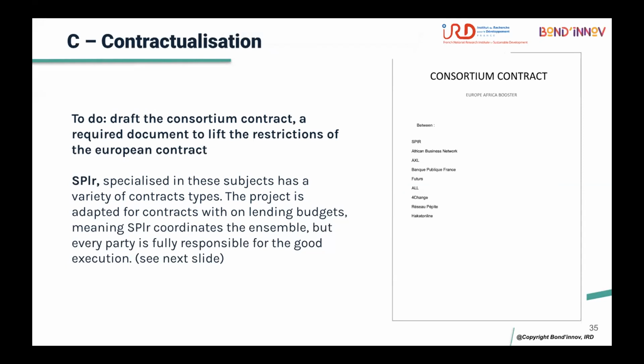Since we received only 70% of the funding, the contract specified with our partners that when my university receives 70%, for the budget of institution 1, for example $10,000, we will send to this institution 70% of its budget. The remaining 30% will be sent at the end of the project, when my institution receives the remaining 30%. This is a kind of agreement in terms of budget distribution and transfer.